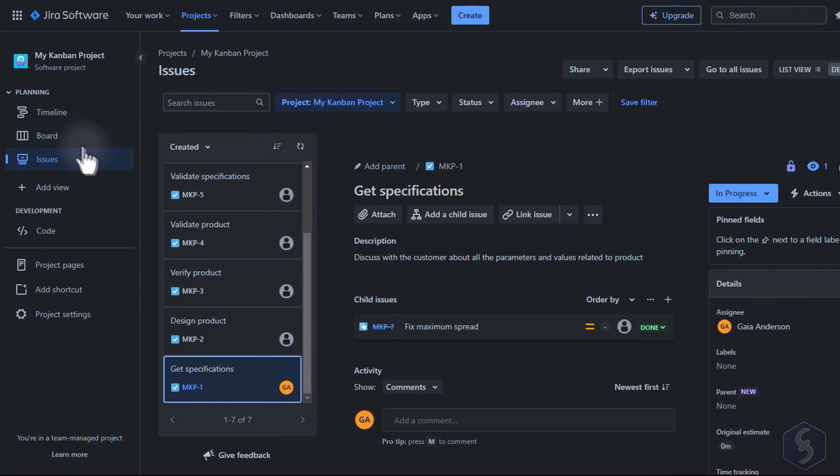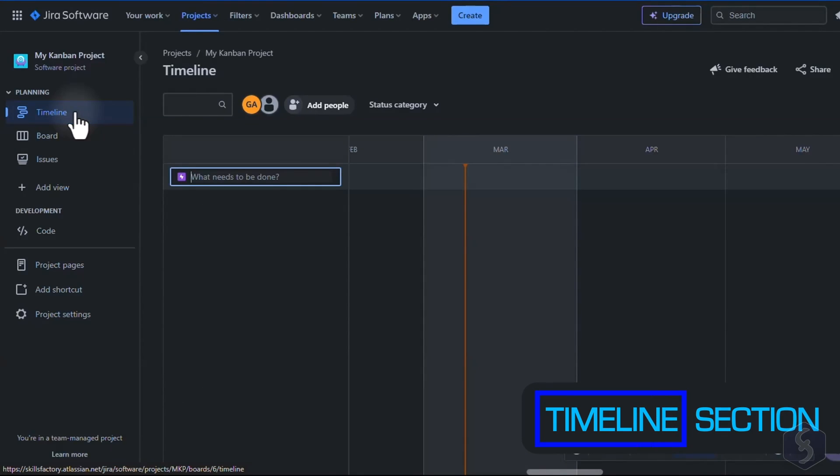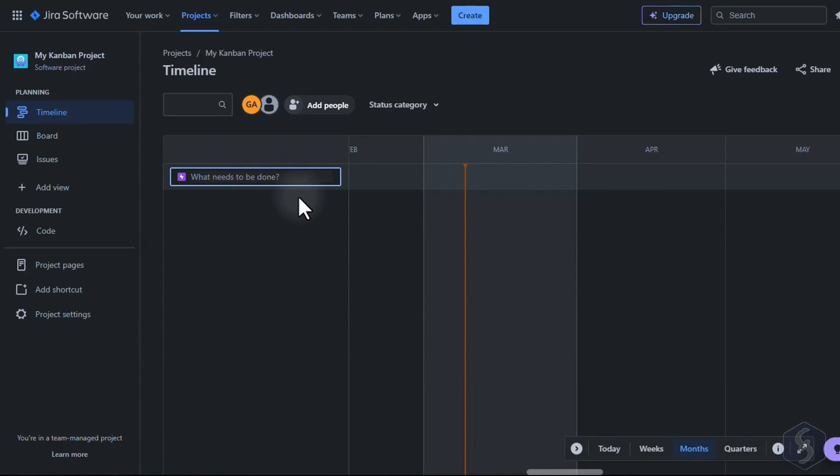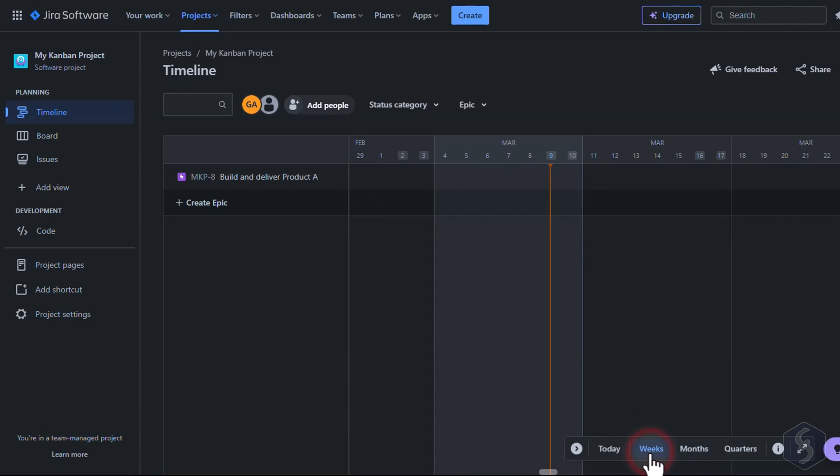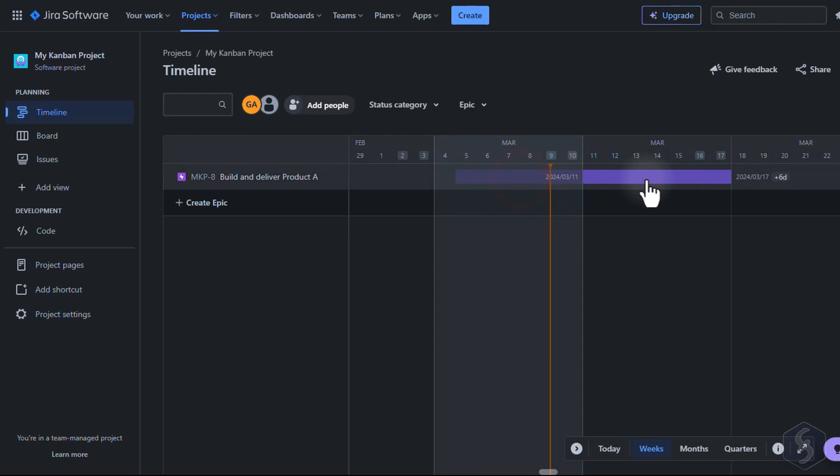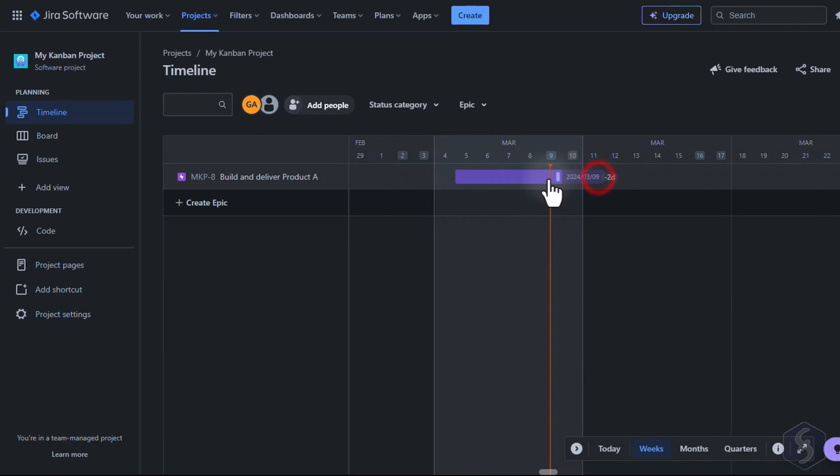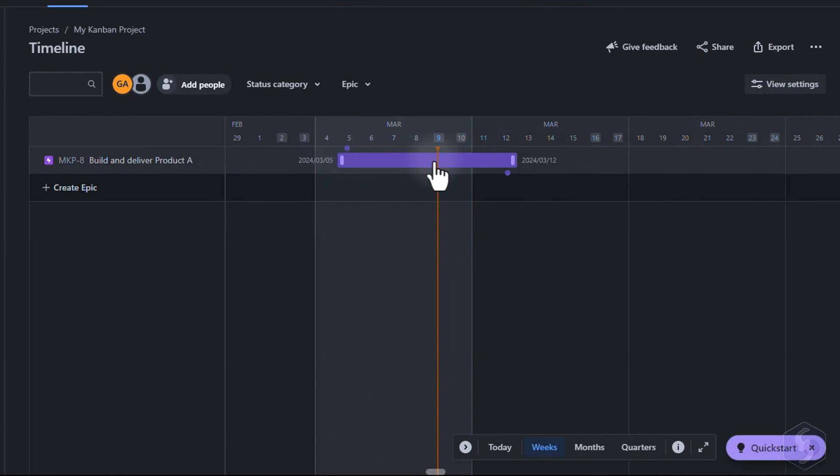Now let's understand the timeline. This workspace is designed to track your major tasks over time called Epic Issues. Drop an Epic Title, apply it with the Enter key and click on the timeline to place it in time as a colored block. You can click and drag it to move it and adjust its duration by dragging from its edges, therefore editing its start and due dates.